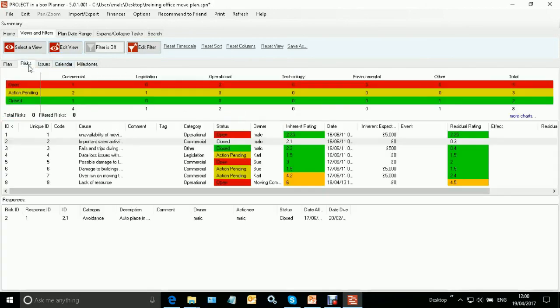The other item we're going to have a look at on here is about color coding the ratings. So for keen observers, you will notice that before, the color coding that you saw on your risk table was color coding for the status, and we've used a red, amber, green associated with the status of it, whether it was open, under action or closed. That's confused some people, I think it's fair to say, who wanted to just colour based on the significance of the risk, its rating. And you've always been able to change the colour of statuses, and often people have gone to 3 different grades of grey or 3 different grades of blue, for example, or taken colours off entirely.